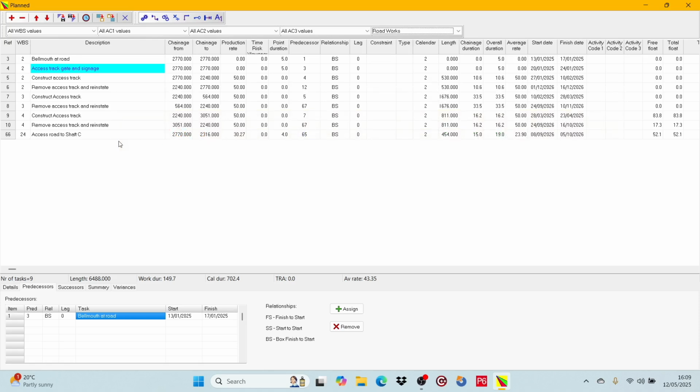So what are the benefits of using the WBS code? Well, it has two primary purposes. The first is it gives you more filtering flexibility in the data input forms, and the second is with filtering for the TimeChainage chart. It can save you a bit of time when creating the filters. So let's look at a couple of examples.